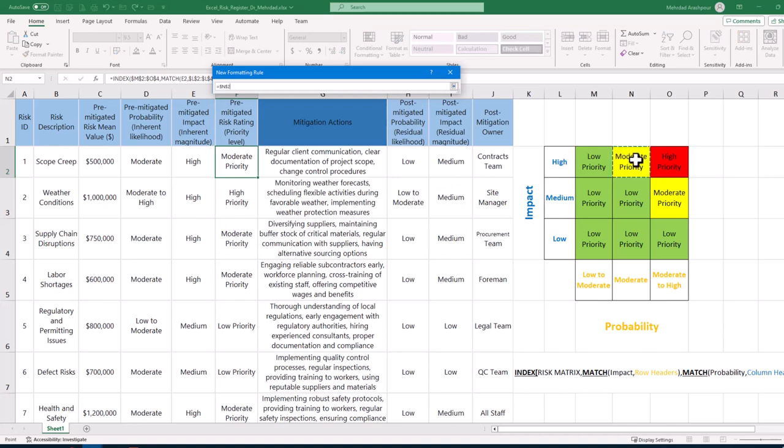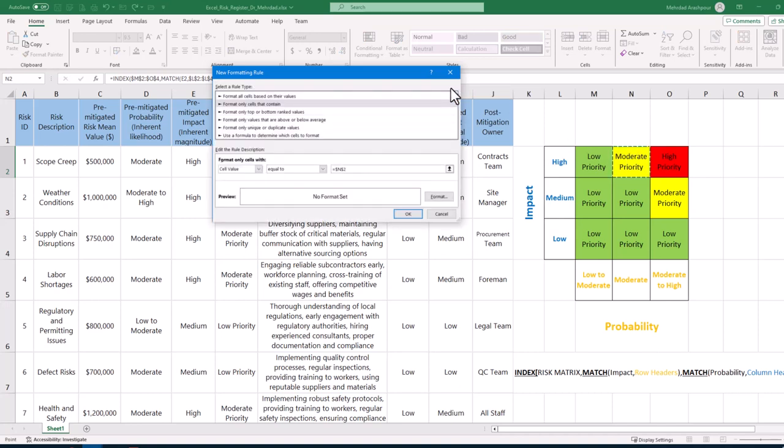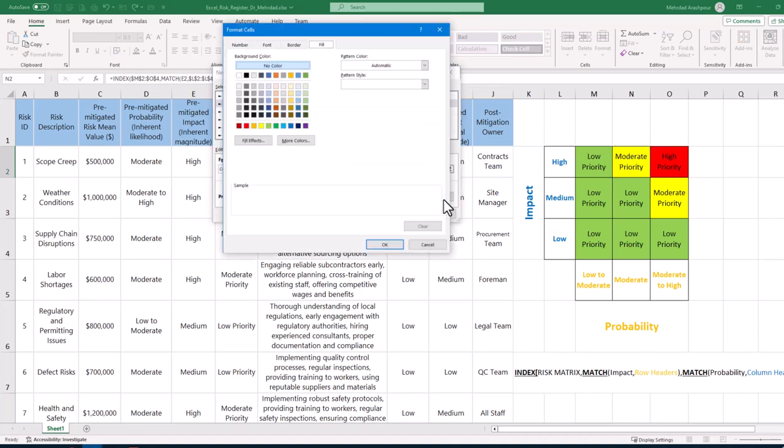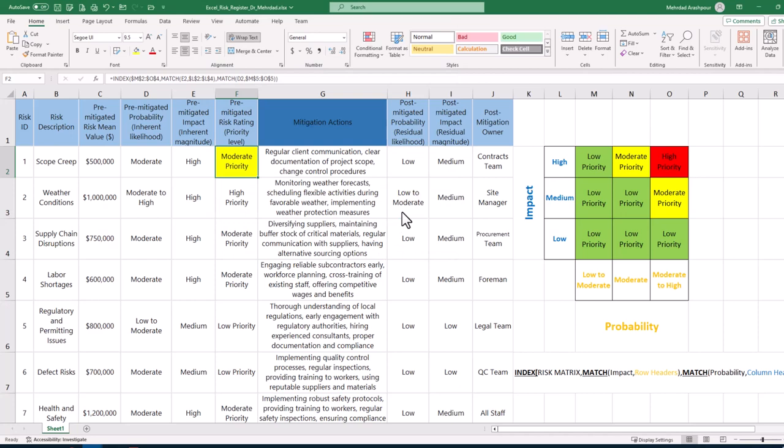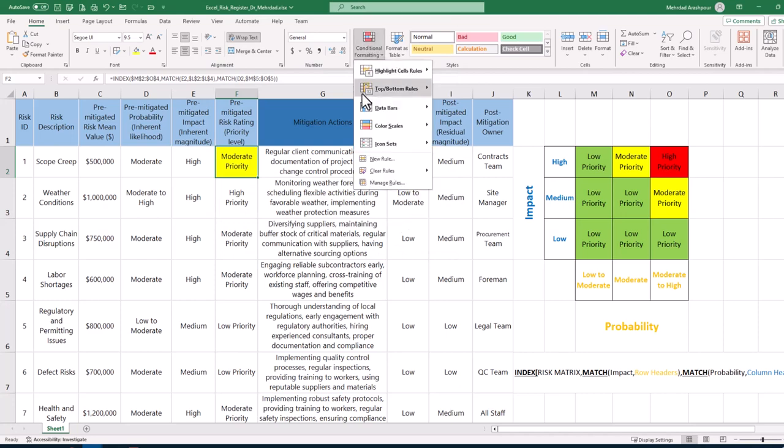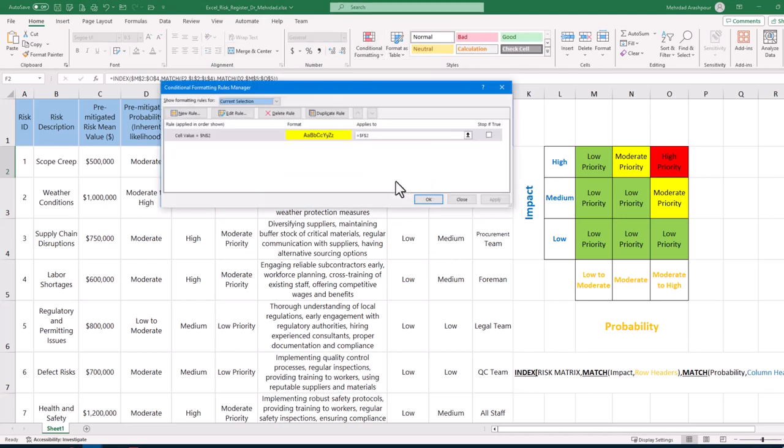Next, we select cell value as equal to the moderate priority in our risk matrix and by clicking format button the fill color is set to yellow. Then we choose manage rules and continue with the new rule of setting low priority to green color and high priority to red color.